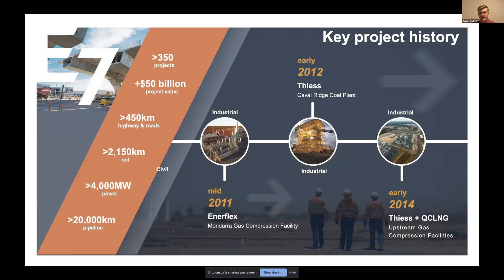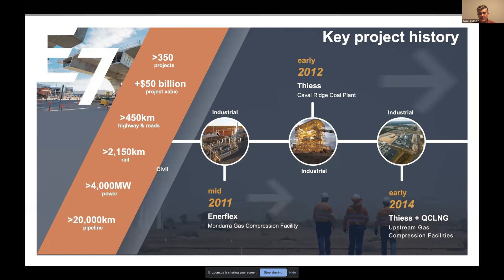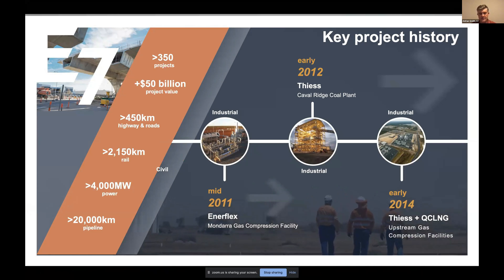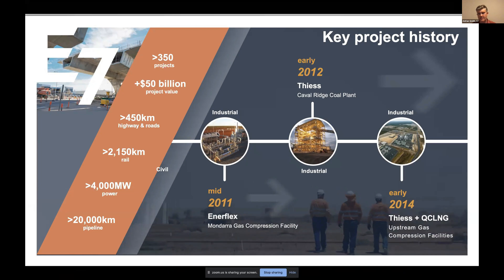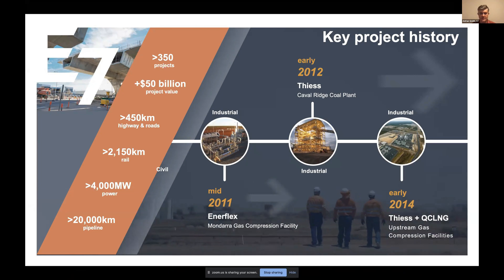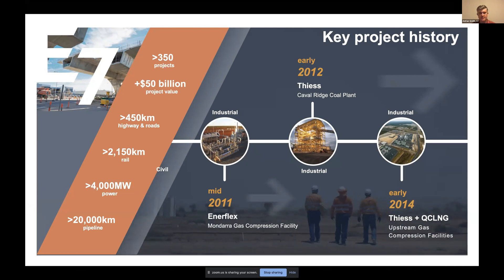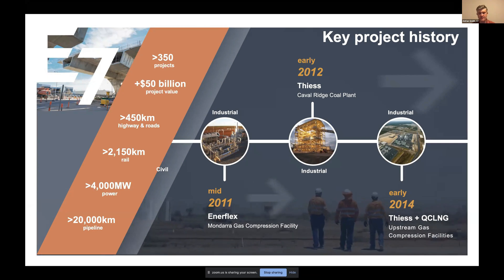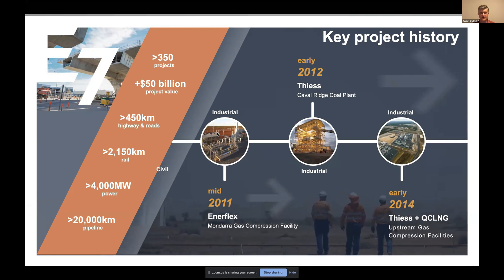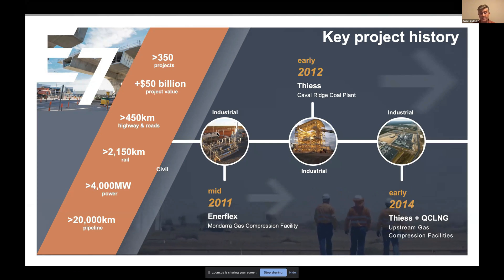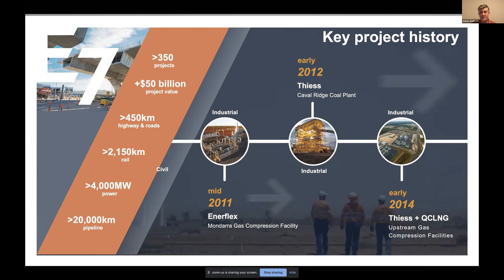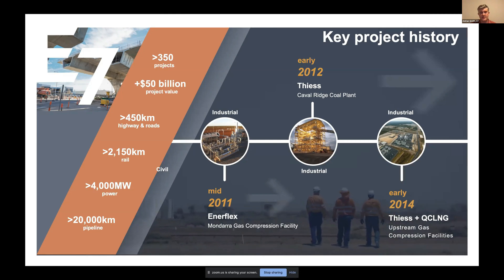Our background is really in industrial infrastructure — gas compression, coal wash plants. Our first major project using E7 was for Shell: 13 fuel compression facilities, 3 central processing facilities, and a power substation — about 2.2 billion dollars of construction executed in 14 months, with around 3,000 users in E7 at peak.